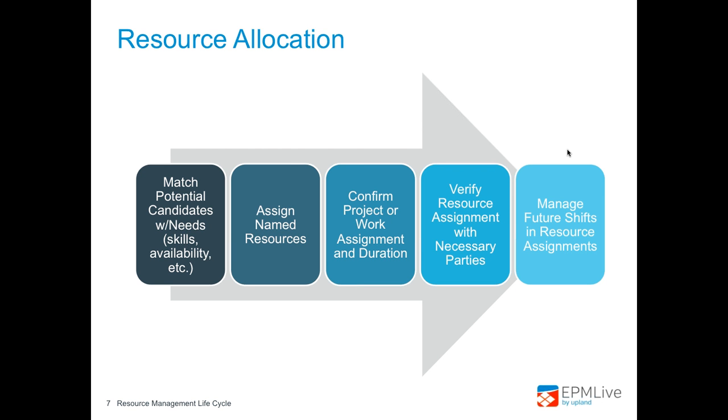In many cases, though, the project teams are known in advance. That might be the case for your organization. In other instances, you may need to be prepared to enter a negotiation process with functional managers, maybe even other project managers, depending on how the organization is shaped, should the resource be currently working on other projects. In this case, project priorities and benefits, as I mentioned before, may be weighed to determine which project has the greater need for the requested resource and the highly skilled resources.